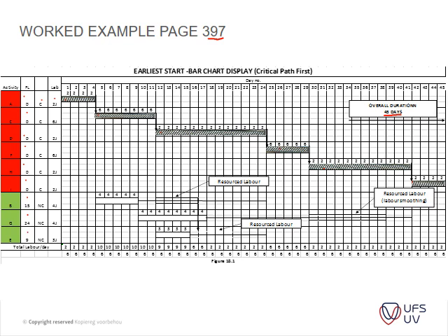I don't think the specific items are relevant for us at this stage, but what you do is list the number of laborers that you need. For instance, here we need 2 laborers per day for item A. For item C we need 6 laborers per day, and D 2, and so forth. You list those laborers and add the number of laborers that you need per day.